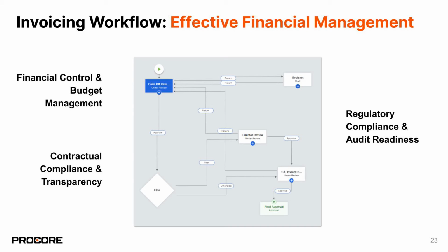Basically, we put it on our GC or our contractor to come in and find their commitment. What I didn't really mention earlier was that when our purchasing team sends out the purchase order, it says on the purchase order, this is how you're going to invoice in Procore. It kind of gives them the directions. So that vendor, GC, whoever gets that, they know exactly where to go into Procore to find their purchase order. They find the commitment, add their invoice, and then it goes through the approval process, again based on dollar limit. We approve it, and what's even great about that at the end is it goes directly to our accounts payable team to just pay the invoice from there, which has saved everyone a bunch of time and money.